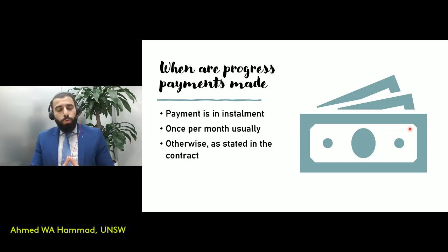However, when it comes to payment schedule, so whenever the payment is scheduled, if the original contract specifies that it's every 2 weeks, then you'd stick with that provision that's specified in that contract. So you can think of the Act as sort of acting to protect the interests of contractors and subcontractors that are making claims. And if these interests need to be protected by abolishing certain provisions that had been specified in the contract, then the Act would do so.